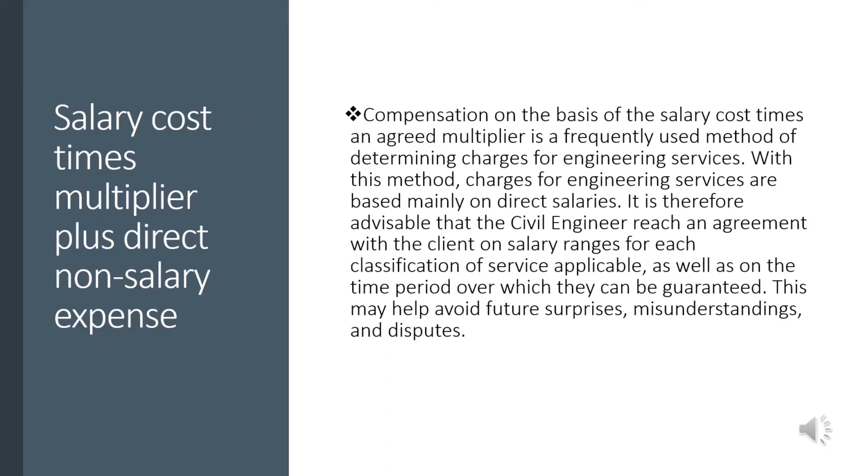There are specific project conditions for which the multiplier method for charging consultant services is suitable. For example, if the scope of the project is not outlined properly, the extent of the project is not defined adequately, or the project is substantial and complex.